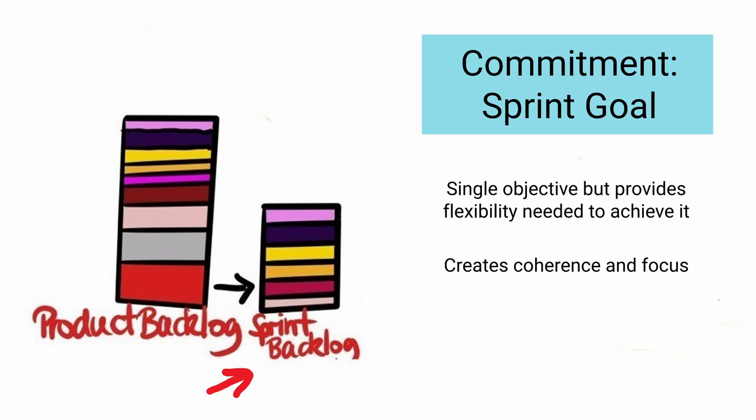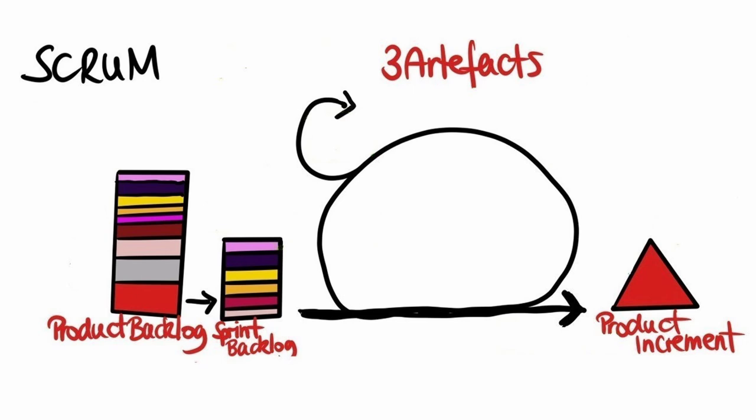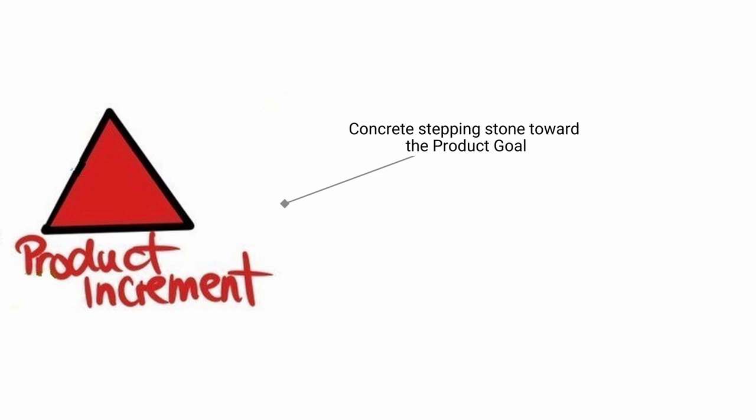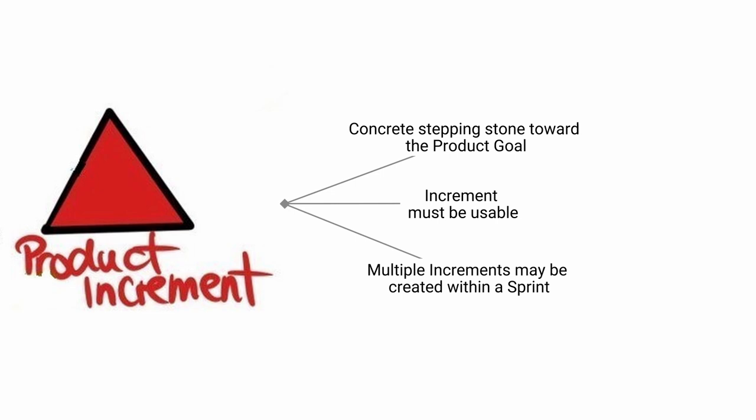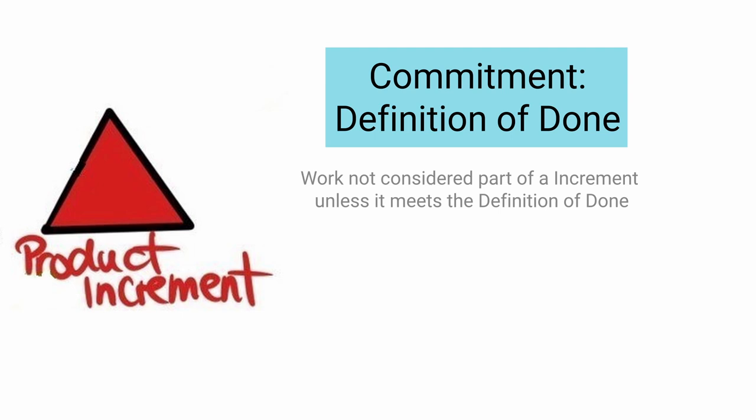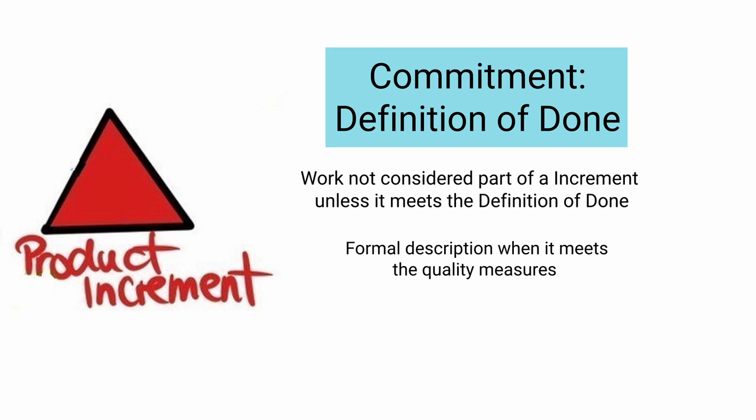Increment. An increment is a concrete stepping stone towards the product goal. In order to provide value, the increment must be usable. Multiple increments may be created within a sprint. Commitment: Definition of done. Work cannot be considered part of an increment unless it meets the definition of done. The definition of done is a formal description of the state of the increment when it meets the quality measures required for the product. It creates transparency by providing everyone a shared understanding of what work was completed as part of the increment.